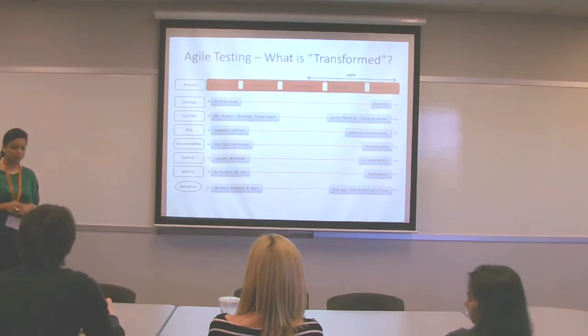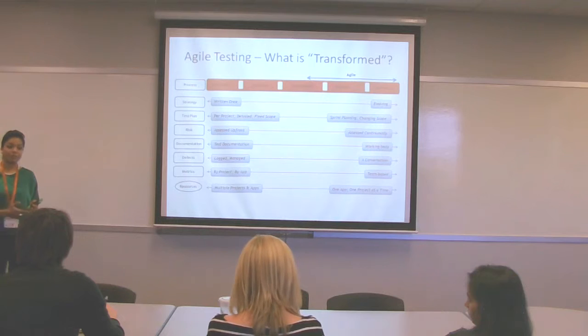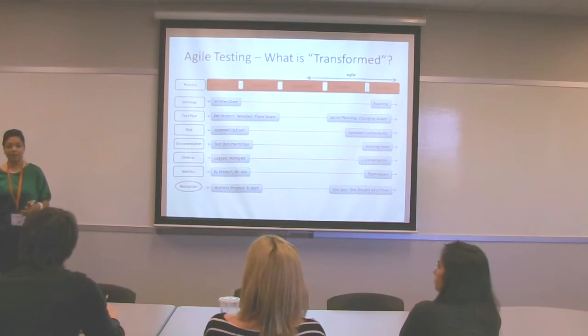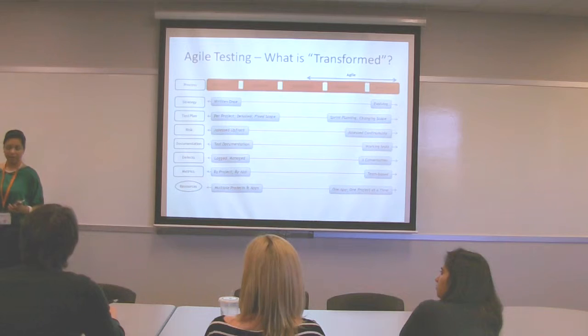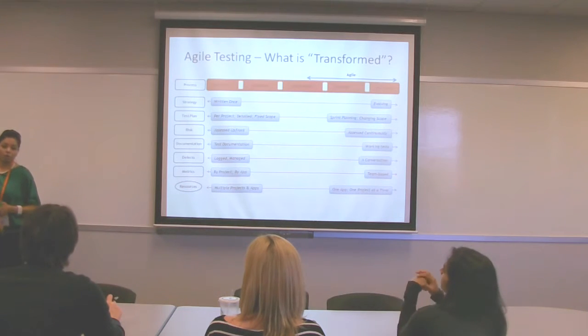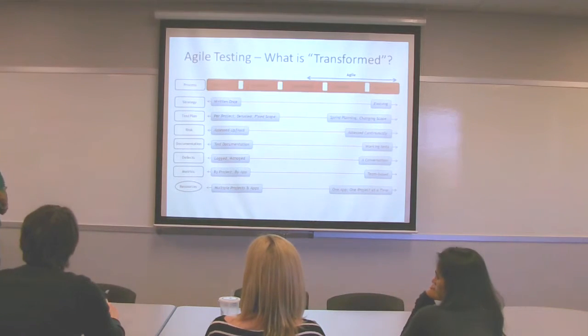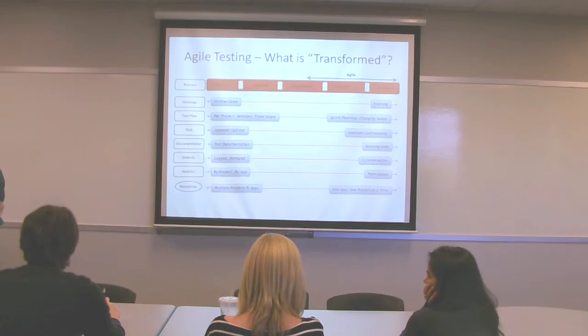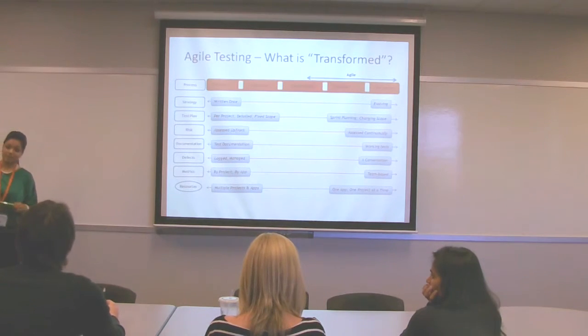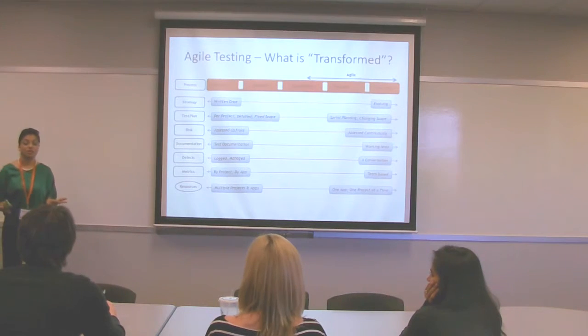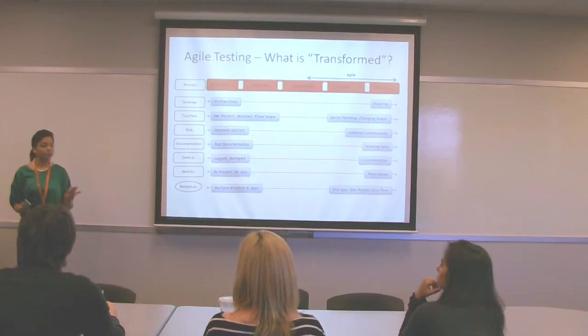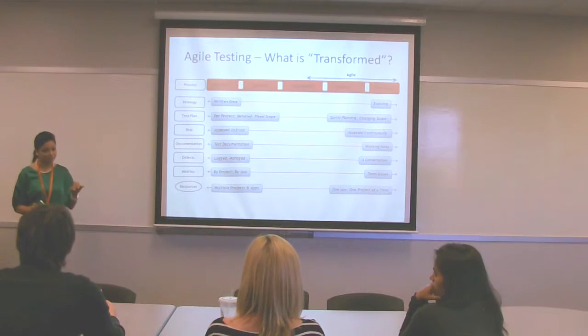Did you say that's after the stand-up meeting is over? Yes, that's what we practiced. I'm just sharing some of the things that I have practiced, being on a couple Agile teams, but it could be at the end of the day. I've seen some of the teams do it at the end of the day, like 4:30 to 4:45, they had a quick defect review meeting or impediment meeting where anything that stopped testing was reviewed. But of course you log it too. Yes. I haven't worked in any organization that go with just a conversation and without logging and managing defects.